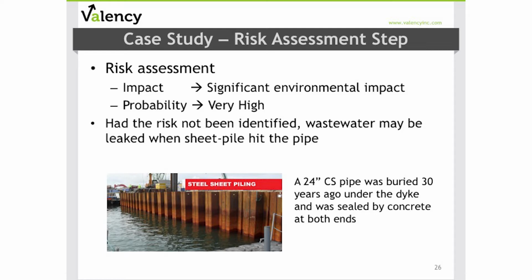The contractor's project manager asked for those revised drawings. It took the owner a couple days to get them to them, and they were able to modify their plan accordingly. So responding to that risk did add some cost and did add some time, but the mitigation prevented a potentially disastrous risk from occurring. Time and time again, we see these types of risks with projects involving substantial renovation and revamp work.